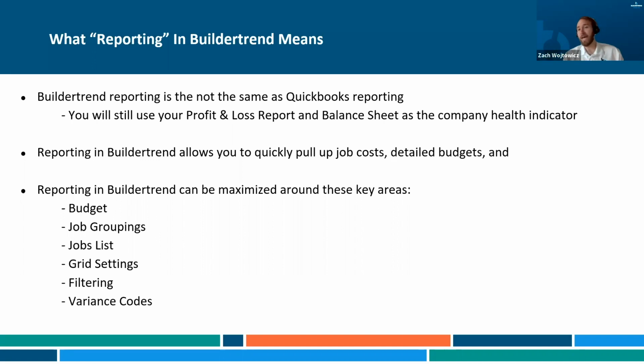And then you can start finding patterns. Okay, I'm going to go to my bills and POs. I'm going to filter by variance codes. I'm going to see how many variances I've had in the last 6 months, and I can see how much those variances cost me in real dollar amounts as well. And all it was was a little flag inside the bill. All I had to do was check a box and say this was a variance.